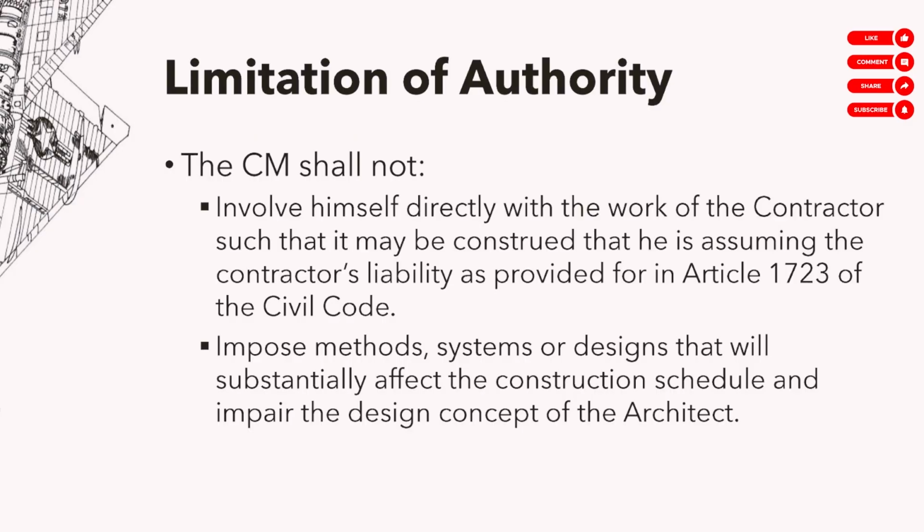Not be involved that directly. No? Dapat let the contractor still do it. Ang trabaho lang ng CM is to ensure na tama yung ginagawa ng contractor. Kung mali, sabihin mo sa contractor, mali. That's all. Okay? Huwag ikaw yung gagawa, kayo magpapagawa. Diba? Kasi pwede na sabihin ng contractor na ikaw na yung nagpagawa. Also, the CM should not impose methods, systems, or designs that will substantially affect the construction schedule and impair the design concept of the architect.